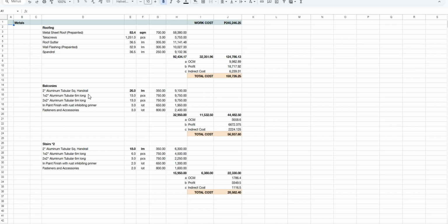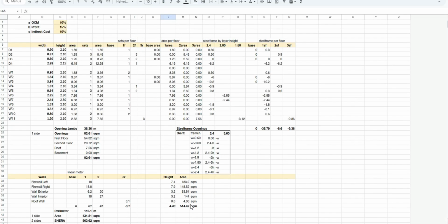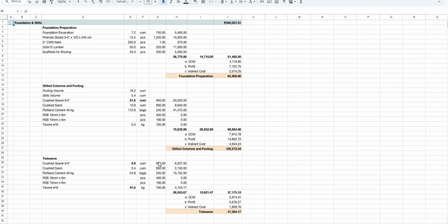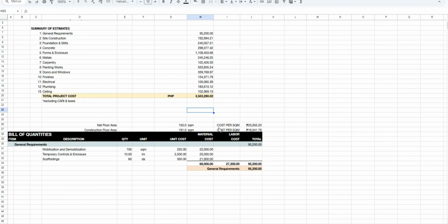And if I have the SketchUp model, then 1 day is enough. But if you give it to me from a PDF, from a CAD file, then I have to remeasure everything. But at least now I have per scope of work. So that's it for those who ask about an overview of bill of materials. This is the material, this is the quantity, this is the unit, and then these are the costings. And if you combine everything together, it becomes the bill of quantities, or BOQ.